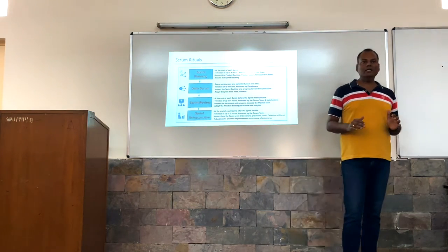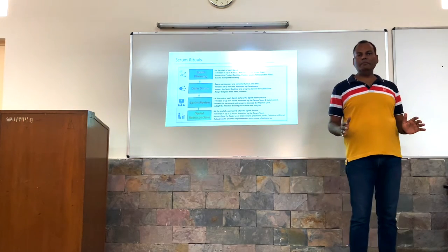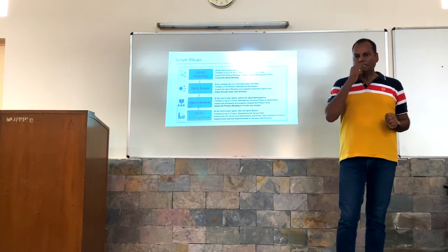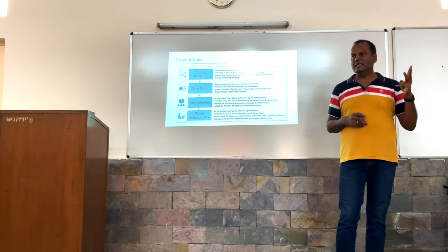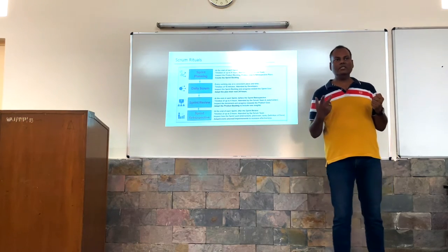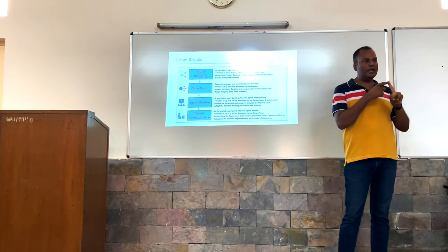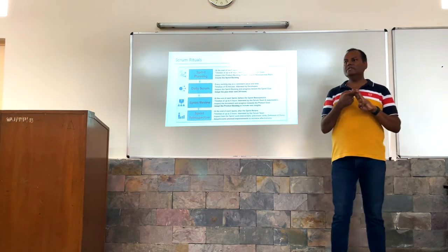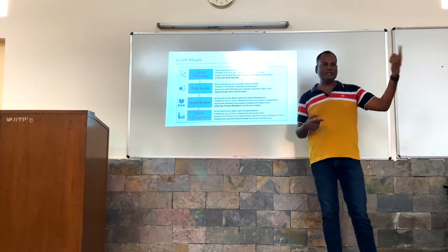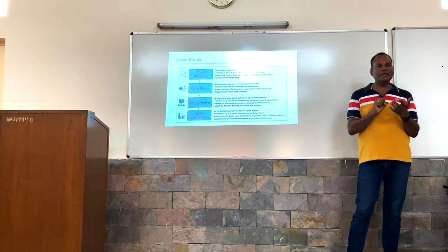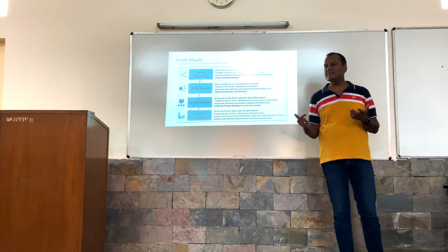Second is the daily Scrum. Every morning, the entire team gathers at one place. Now it is online, so maybe on a Zoom call. And every person discusses only three things: what I did yesterday, what I am going to do today, and what are the impediments and bottlenecks I am facing. And it's the Scrum Master's responsibility to note it and resolve those impediments later on.